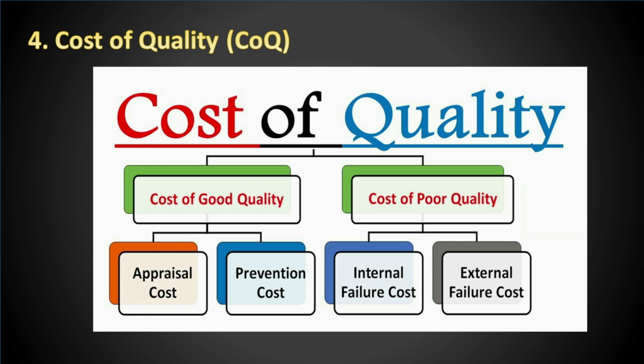Cost of non-conformance can be either internal failure costs. Costs associated with fixing the deliverables after defects are found internally by the testing team. Or external failure costs. Costs associated with repercussions after defects are found by the customer. This is the most expensive type of cost, both tangible and intangible.